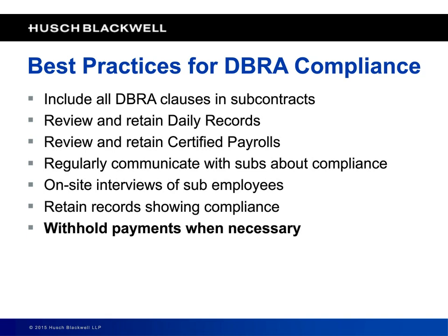Make sure that they are aware of their obligation, not only to comply for themselves, but also to make sure that any lower tier subcontractors that they may get involved are also in compliance, and that they sign a statement of acknowledgement. That standard form 1413. They've got to sign that. You should have that for every subcontractor at every tier, that they acknowledge that all those FAR-related clauses that implement the Davis-Bacon Act are included.